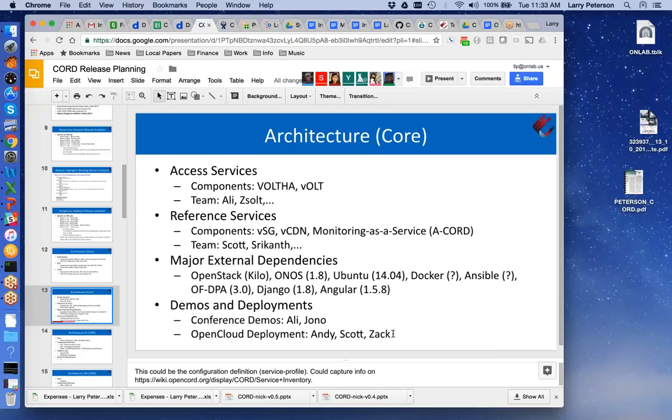And that has required changes to ONOS core, the driver for sure, and even the application has changed for the fabric control, just because we have removed some of the workarounds that we had done in 1.7 when there were still bugs with the older version of OFDPA. So what that means is that ONOS 1.7, CORD 1.0, all of that works for the older version of OFDPA. And since in master right now, we have moved over to the new version of OFDPA and brought about all of these changes, it only makes sense for me to